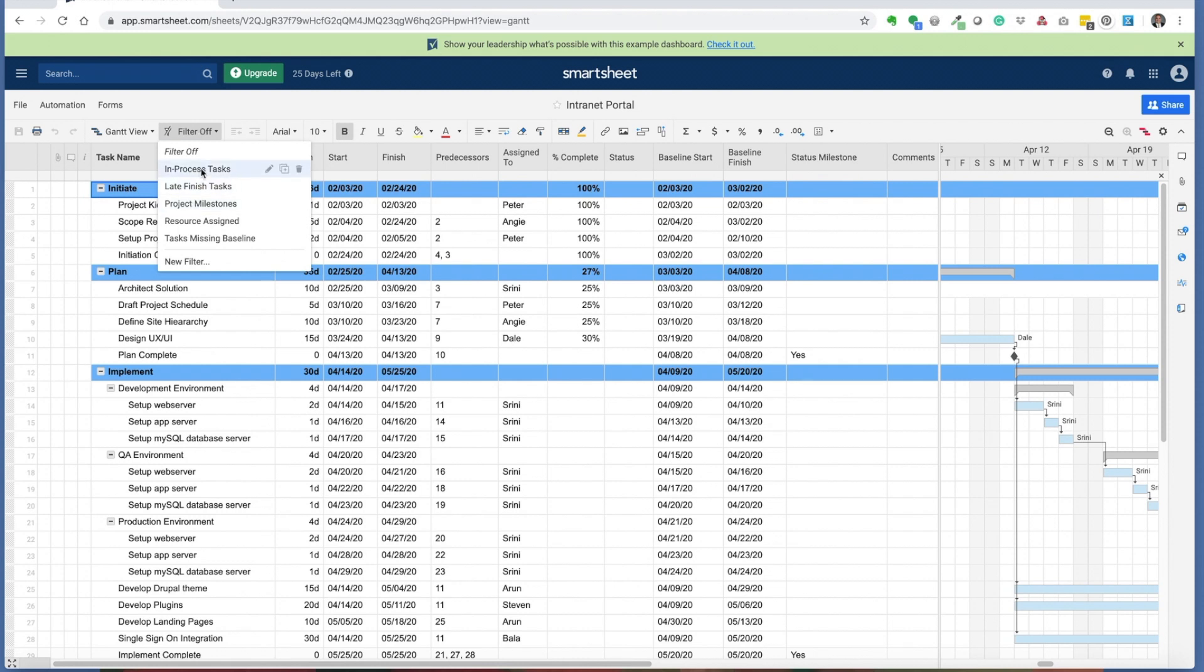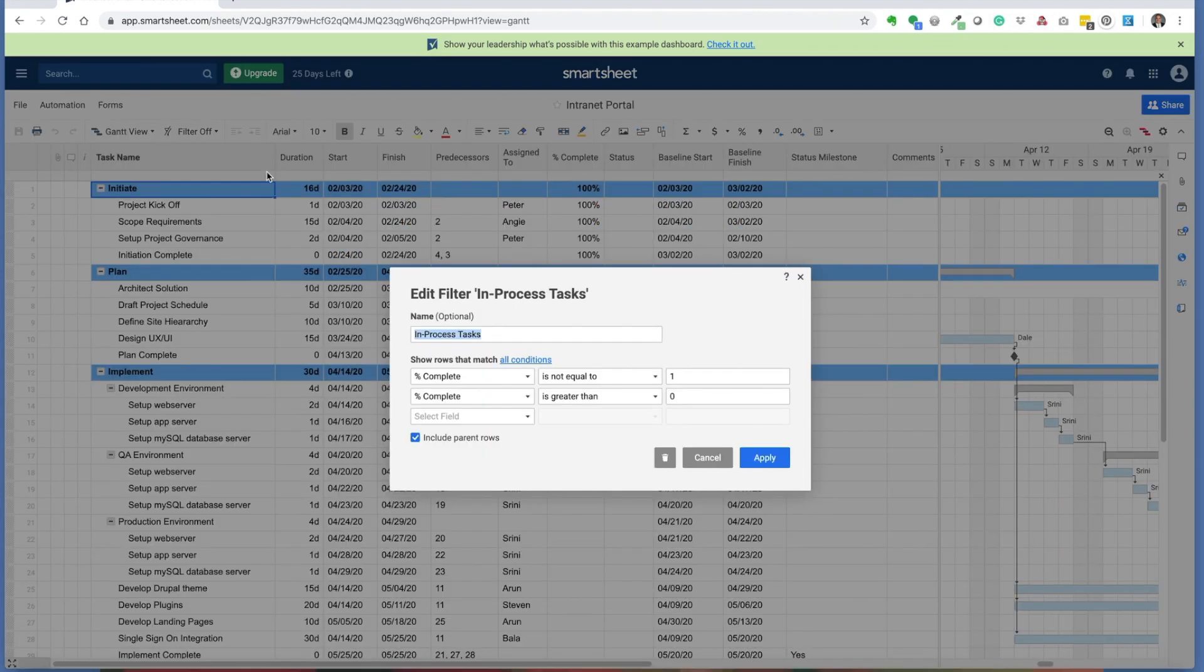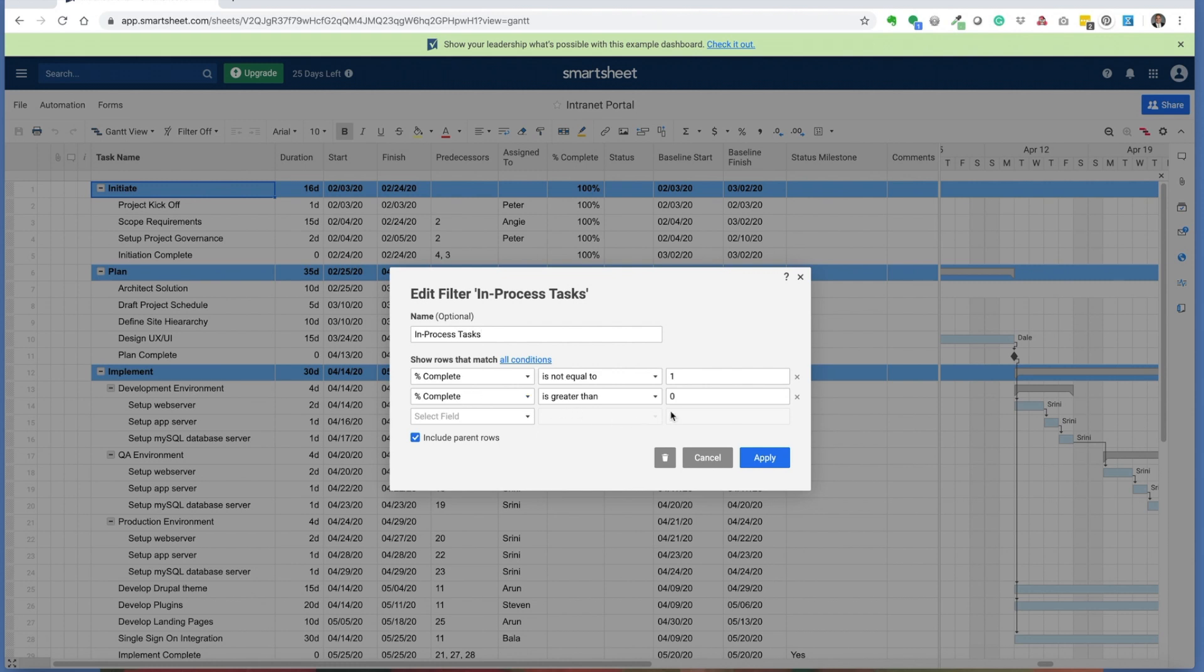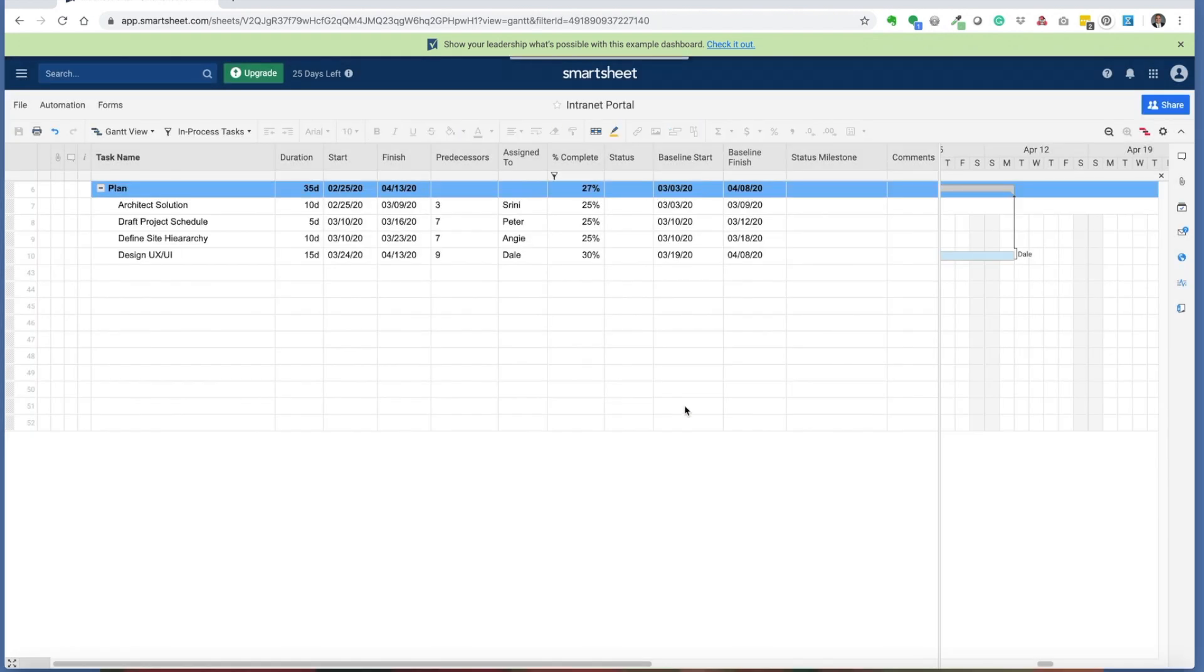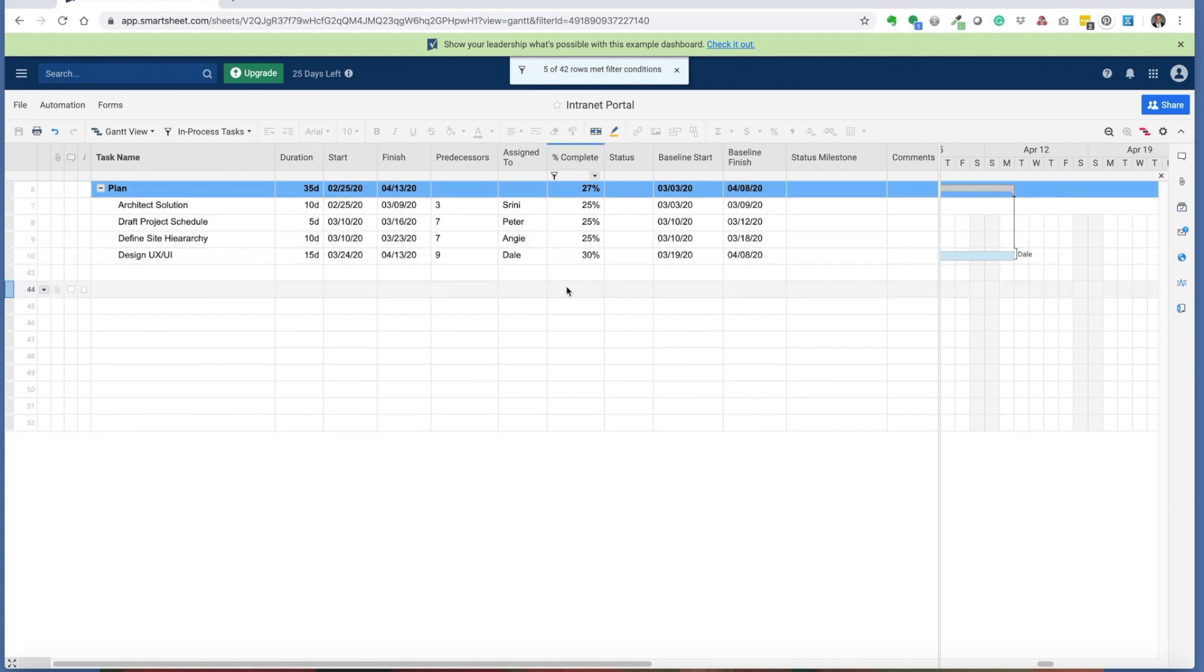To start with the in-process tasks, you can modify your filters by clicking on the filter menu. If I click on the edit icon you'll see how the in-process task filter is built. This is set up to show where percent complete is not equal to one and percent complete is also greater than one, matching all conditions. I choose to use include parent rows because it helps identify and show visibility of where the task actually aligns within the overall project schedule. This shows me all my tasks that are in process because there is a percent complete that is active on it.